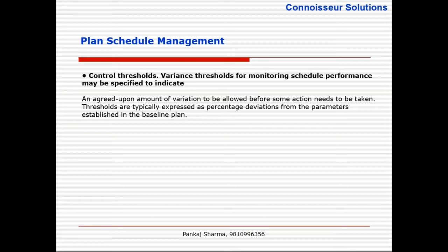People make mistakes. Some amount of rework will happen based on your efficiency level, so that is a tolerance level. Buffer is, there will be risks, so you will respond to risk, so you have a separate buffer for it. Tolerances are different, buffer is different. Buffer is to respond to risks, whereas tolerance is, we will make some mistakes in predictions. Nobody works in a straight line.